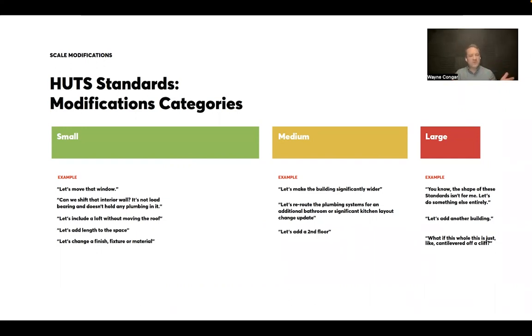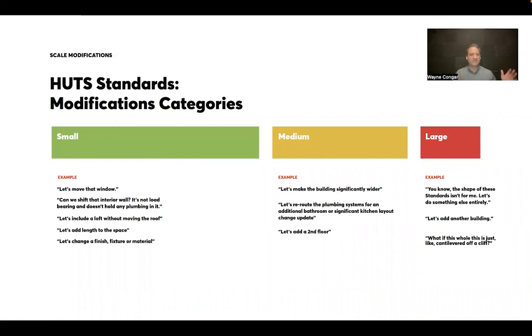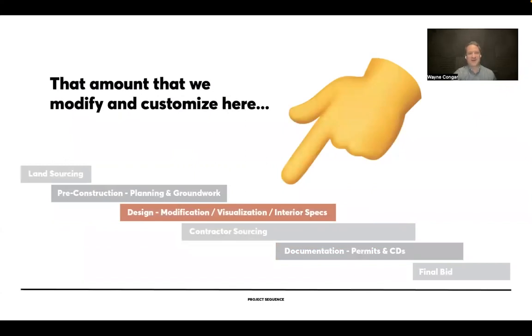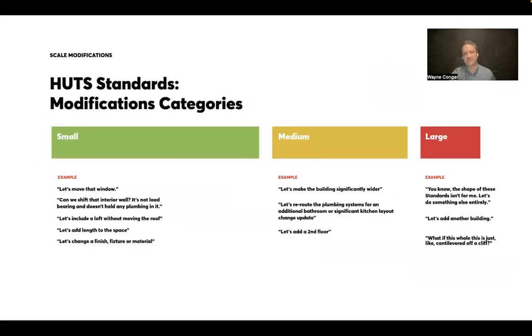And so it's a way for you to think about what's small, what's medium, and what's large. So for instance, we might hear from a client on the small side, hey, can I move that window? Or can we shift that interior wall? It's not load bearing. It's not going to change any plumbing. Let's include a loft without adding a full second floor. Let's add length to the space. Let's change a finish, a fixture, or material. These are things that we hear all the time. We sort of account for in our process and in our approach and in our scopes of work, many, many of these revisions to happen. And they have very little downstream impact in this relationship that you can make as many of those sort of design modifications as you like. And it has very few ramifications in the documentation side of the project.